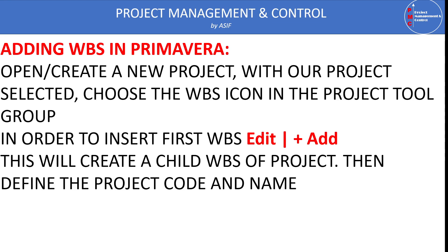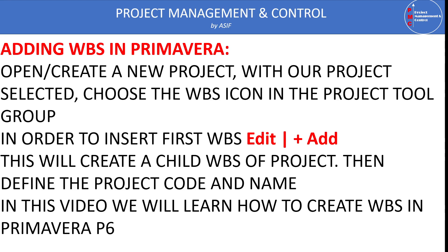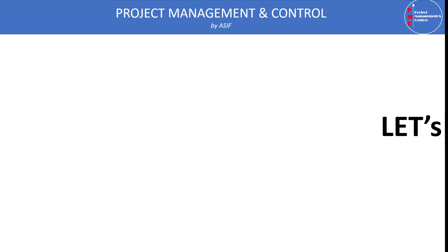Once we have opened the project, we insert the first WBS by going into Edit and clicking the plus button. This will create a child WBS. If you select, for example, design and click the plus button, it will add something under design such as concept design. If you want to make a sibling WBS — meaning a different WBS at the same level — you go to the parent WBS and click the plus button. We will see this in the P6 demo.